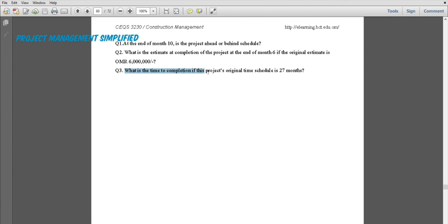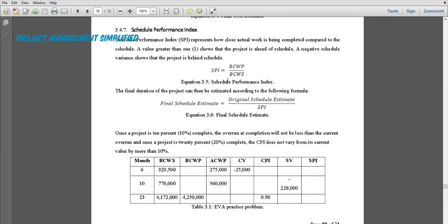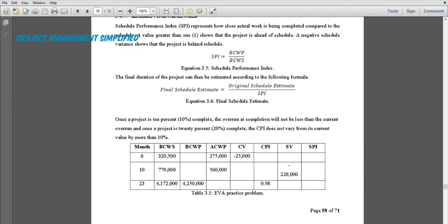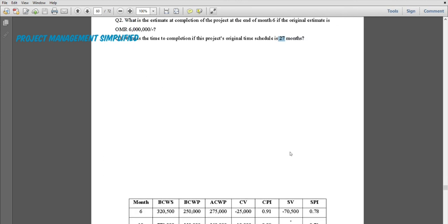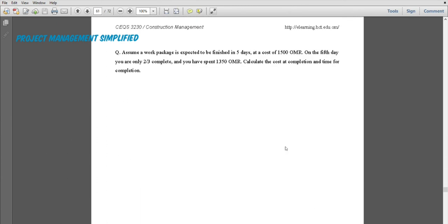What is the time to completion if the original time schedule was 27 months? This question is related to the one above — both reference the month-6 monitoring point. The final schedule estimate is the original duration of 27 months divided by the SPI at month 6. We will now go through how to calculate all these values.